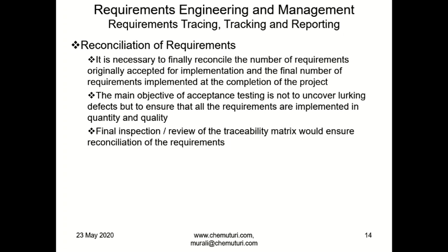Reconciliation of requirements. Should we reconcile the requirements? Yes. What are the originally defined requirements and what are the finally delivered requirements? And the total number, quantitatively and qualitatively. It is necessary to finally reconcile the number of requirements originally accepted for implementation and the final number of requirements implemented at the completion of the project. If we are diligent in implementation, the delivered requirements ought to be more than the originally defined requirements. If we sloppily implemented the requirements, the defined requirements would be more in number than the delivered requirements.